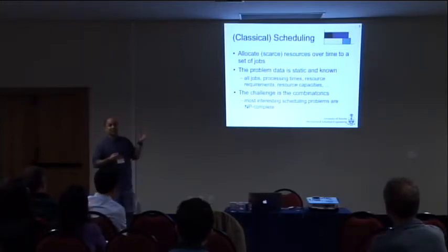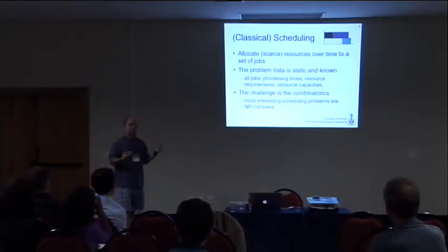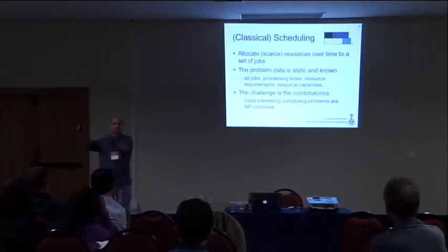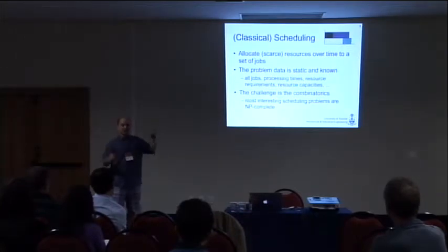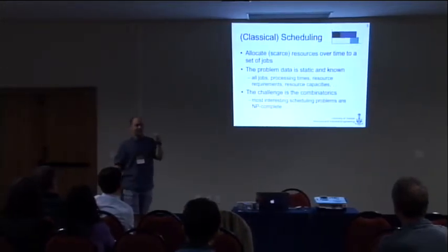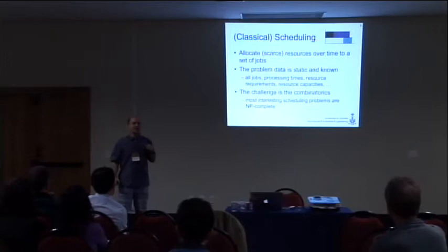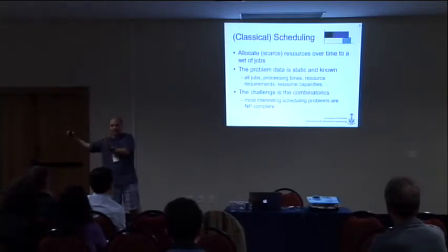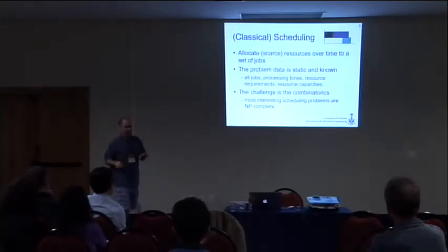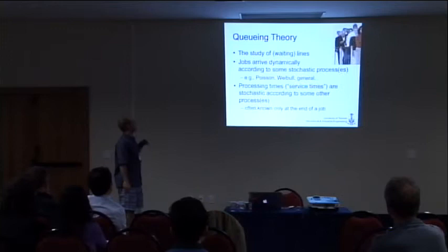Now there is work on dynamic scheduling, but typically in this framework, dynamic scheduling tends to be periodic static scheduling. We have this tool, which is some really great algorithms for static scheduling. We see what has arrived, and for a short term, we schedule those activities, execute them, see what's arrived again, and do it again. That's a bit of a simplification, but it's almost true.